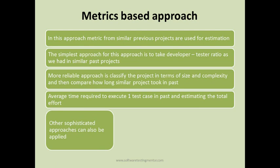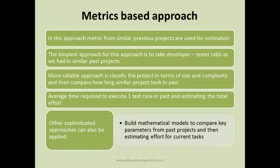More sophisticated approaches can also be applied in the matrix-based method — for example, building a mathematical model to compare key parameters from past projects and estimate effort for current tasks. This could include how many test cases were documented in previous similar projects, what time it took to execute 100 test cases, how many defects were raised per 100 test cases, and how much time was required to fix and retest them. All this information can be fed into mathematical models to generate effort estimates.